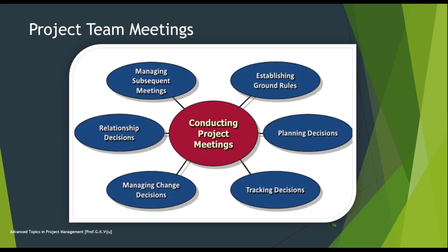Then comes change control meeting. It is organized by the change control board. The purpose of this meeting is to review the change request, whether to accept and include it in the project or reject it.